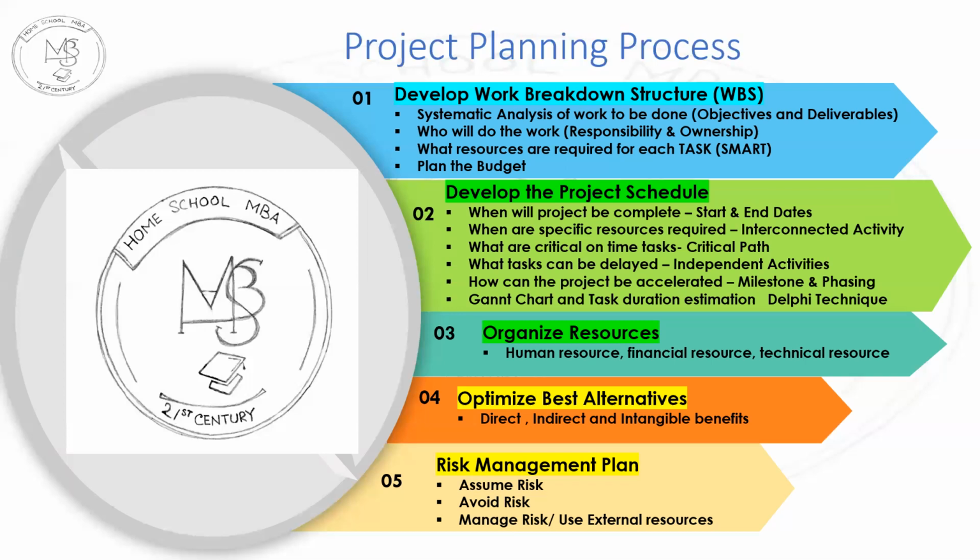And then the end date, you work out how long the project is going to take, and that can be determined if you have done such projects in the past, so you would know how much time it took. That's why we say keep the record of projects after you have completed. So maybe as a project manager, you have completed a number of projects in the past. So that will help you to fix the end date.